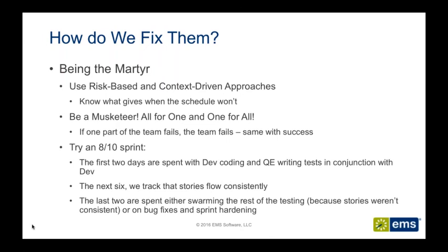A lot of times what we tend to not do is, if something is added to our plate, we don't have that next step conversation to say, okay, since this is being added to my plate now, what is our plan as a team to take on this work? Are we all expected to work longer hours to take in this work? Are we all willing to remove one or more stories to take on this work, or something like that? We tend to just say, oh, somebody added it to our list, now we have to do it, without having that deeper conversation during those stand-up times.